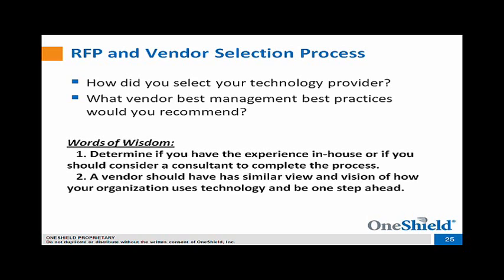Yeah, I echo Martina's view of the vendor track record. Since I'm on the delivery side of OneShield, what I think is critical, policy replacement or any kind of transformation that involves policy is large, it's complex, and so I think it's critical that the vendor you choose has experience with the complexities that surround not just the configuration of policy, but everything that surrounds it. So do they have experience with the complexities of data migration and conversion? That can be a huge problem right there that needs to be solved. It has to have the right strategy, et cetera. It typically should be its own work stream.